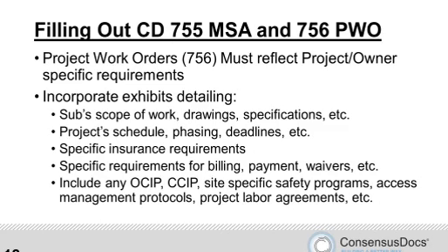open up to this type of master relationship, I think it's important to do a proper vetting of who they are, which means you have to look at their past and current performance. You want to look at their safety record. You want to look and see the extent to which they are involved in claims and litigation. Examine their bonding and insurance, their financial well-being generally, their staffing levels, and all these kinds of things. And you may want to develop and utilize some sort of subcontractor qualification forms.